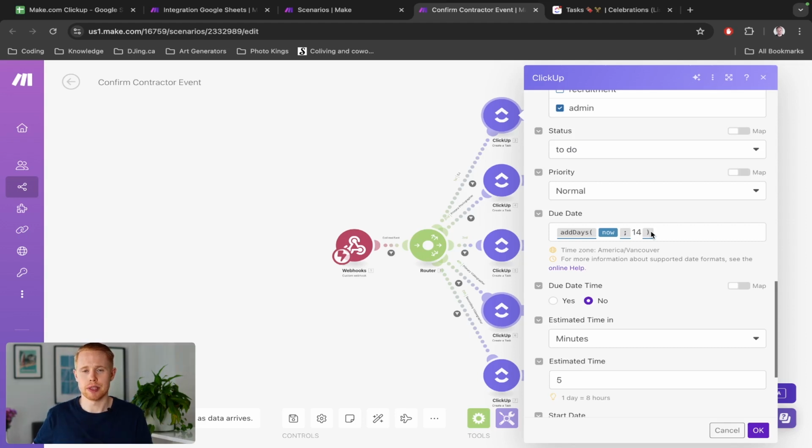Like for my business, I take a backwards approach where we have dates for clients that are always variable, right? Because we're in the wedding space, it just depends ultimately on the client's date of their event. And then we will set tasks like 14 days before that, or 30 days before that particular event, right? But if you're maybe in digital marketing and you know for certain that you need to get your project wrapped up in a month, things might be different.